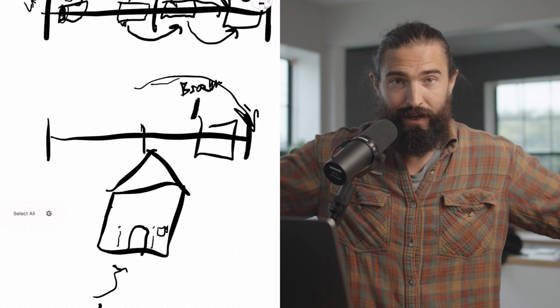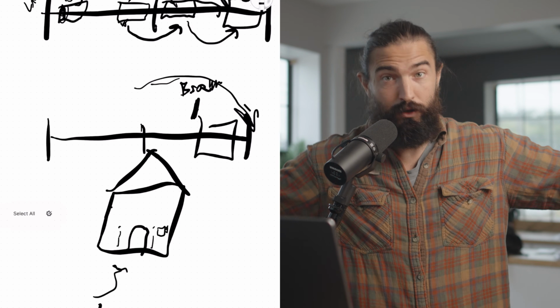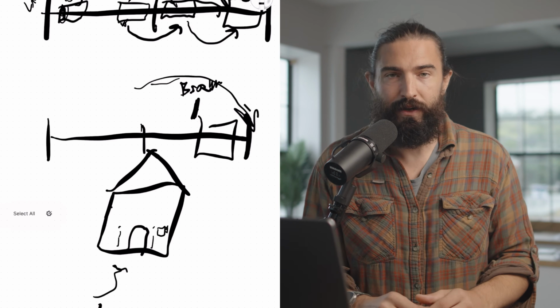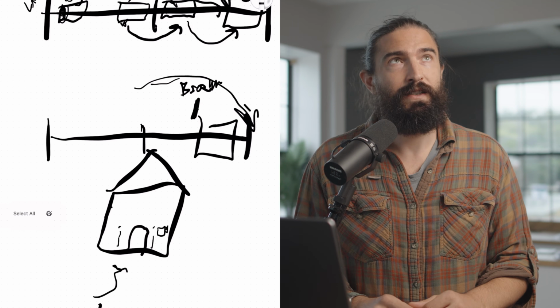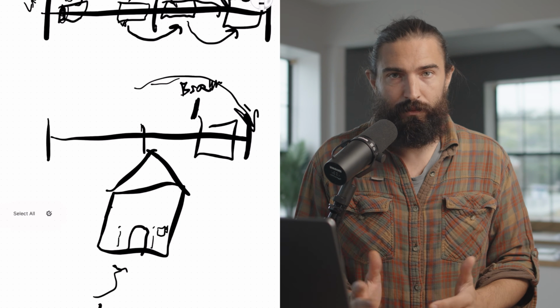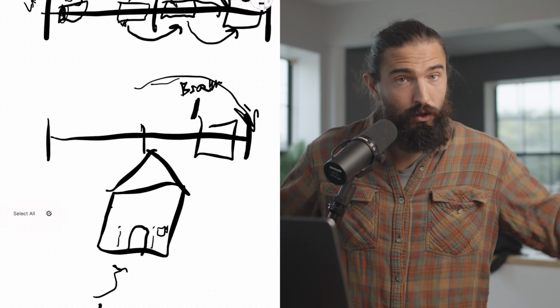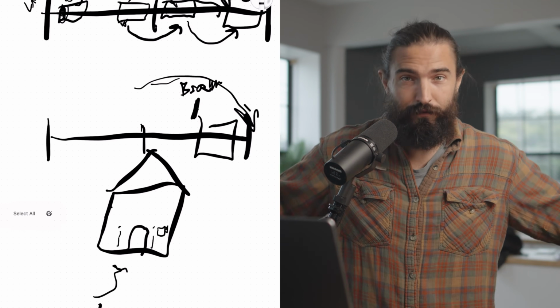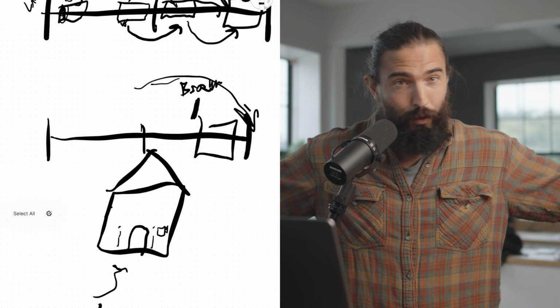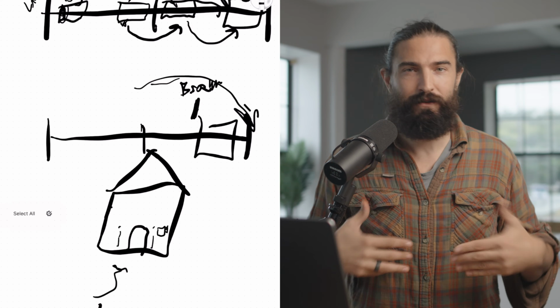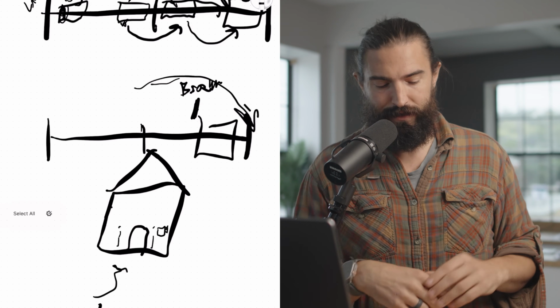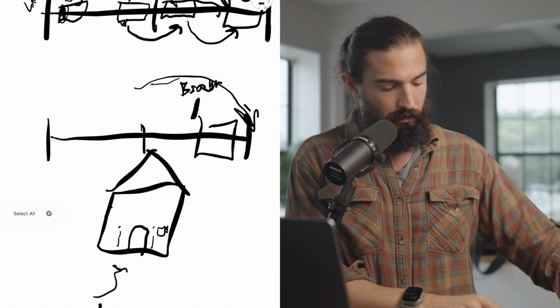That's $1,000. If we were saying the 250 number, $1,250, the material is going to cost what? Same as. So let's say it's $1,000 for materials. So now I'm in like $2,000, $2,250. Where the hell's the $4,000 coming from? I'm like, am I missing something? Putting it back on me, but I know I'm not missing anything. They're trying to get a huge rip.